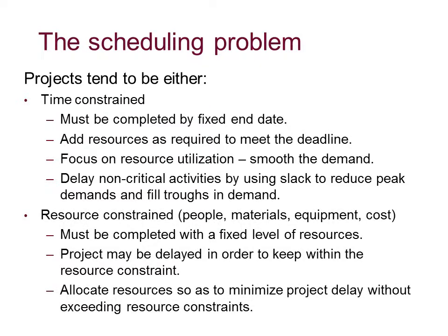Or they can be resource constrained. Resources can be people, materials, equipment, costs of other sorts. So here the project has to be completed within a fixed set of resources. Time is less of an issue, resources are the issue. The project may be delayed in order to keep within the resource constraints which are being imposed upon the project, and they might have to allocate resources so as to minimise project delay, but without exceeding resource constraints.